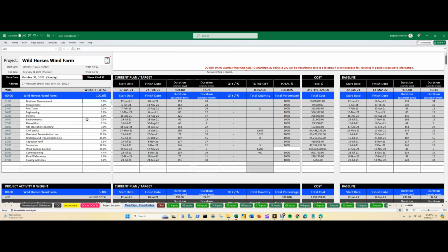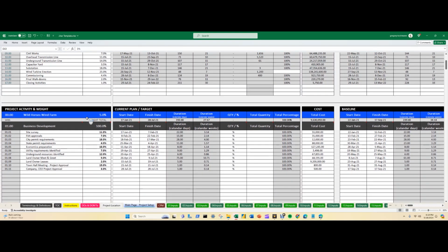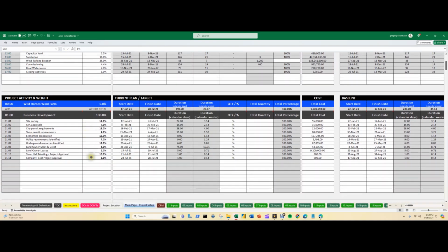When you do the structure, that's part of the project. Landscaping is part of the project, but you probably weigh landscaping as something like 0.1%. It needs to get done, it needs to be tracked, but it's not going to prevent you from having a functional project such as moving into your structure.